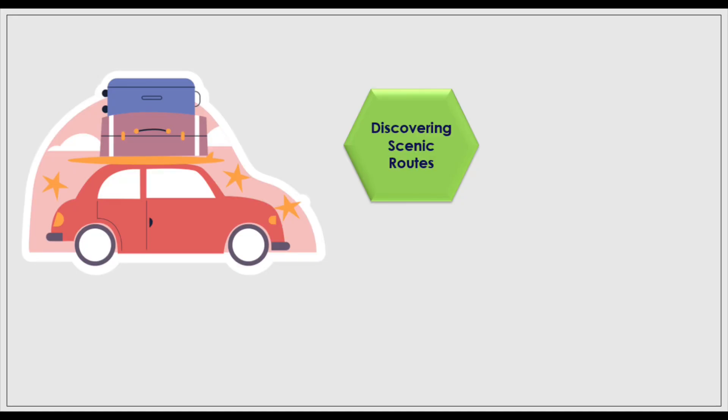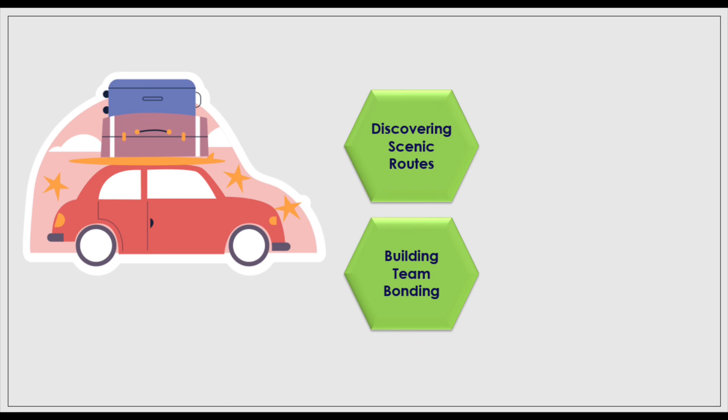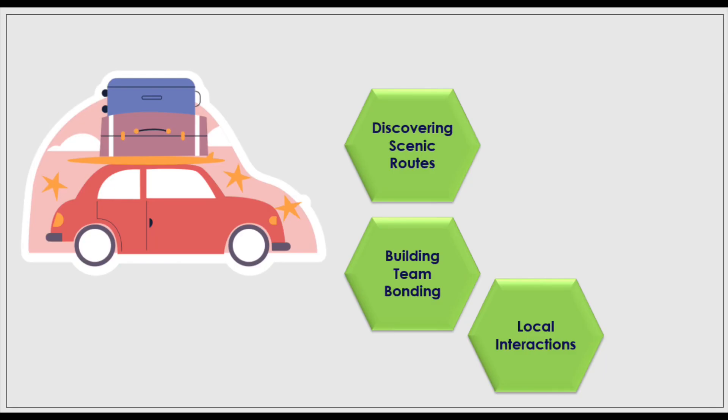Let's consider the road trip example and think about positive and negative risks. For positive risk: the risk of getting lost might lead to discovering beautiful scenic routes not originally planned. A flat tire or GPS malfunction might create an opportunity for the group to work together, fostering team bonding through problem-solving. And if navigation tools fail, it could lead to interacting with locals for directions, potentially resulting in cultural exchanges or discovering hidden local gems not on the original itinerary.